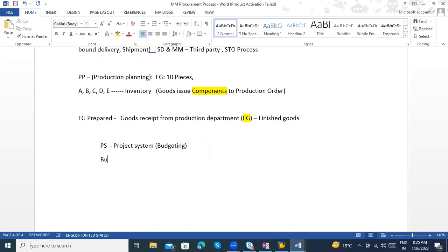So the budget cost is 5 crores. Now when I'm thinking about the activities, because in construction there are so many activities, if I'm not dividing these activities, then it's very difficult to control the budget. Because sometimes instead of pillars I might put 1 crore, and if I'm spending 2 crores for the pillars, then I don't have an amount for the remaining construction, right?